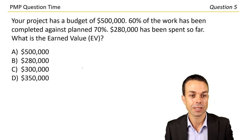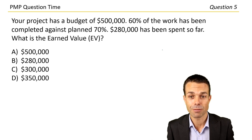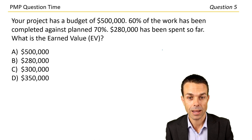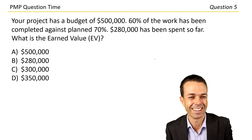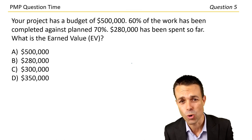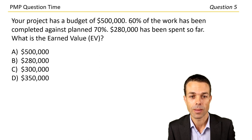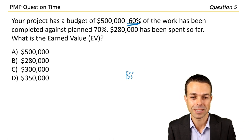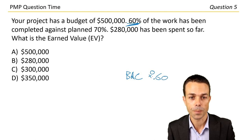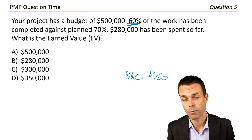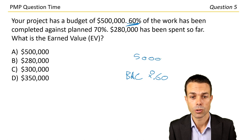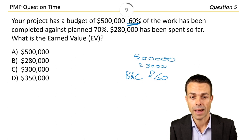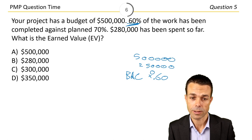Question five. Your project has a budget of $500,000. 60% of the work has been completed against 70% that was planned. $280,000 has been spent so far. What is the earned value? Earned value is the percentage of complete work multiplied by the budget at completion — so $500,000 times 0.60. 50% of $500,000 is $250,000, plus another 10% which is $50,000, gives us $300,000.